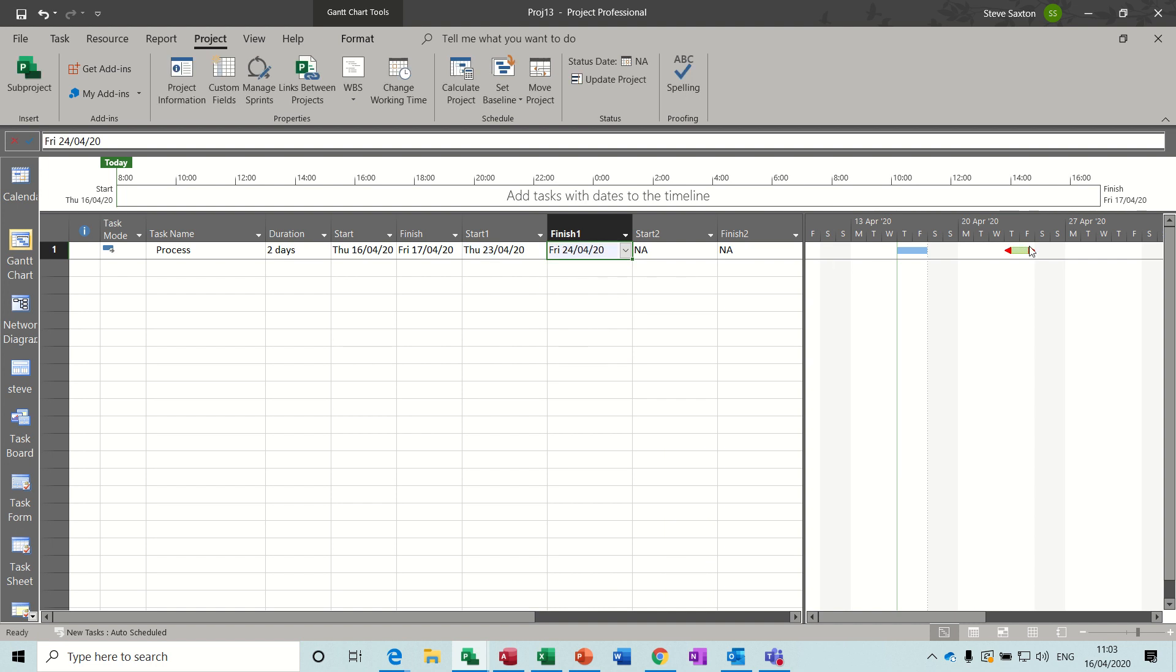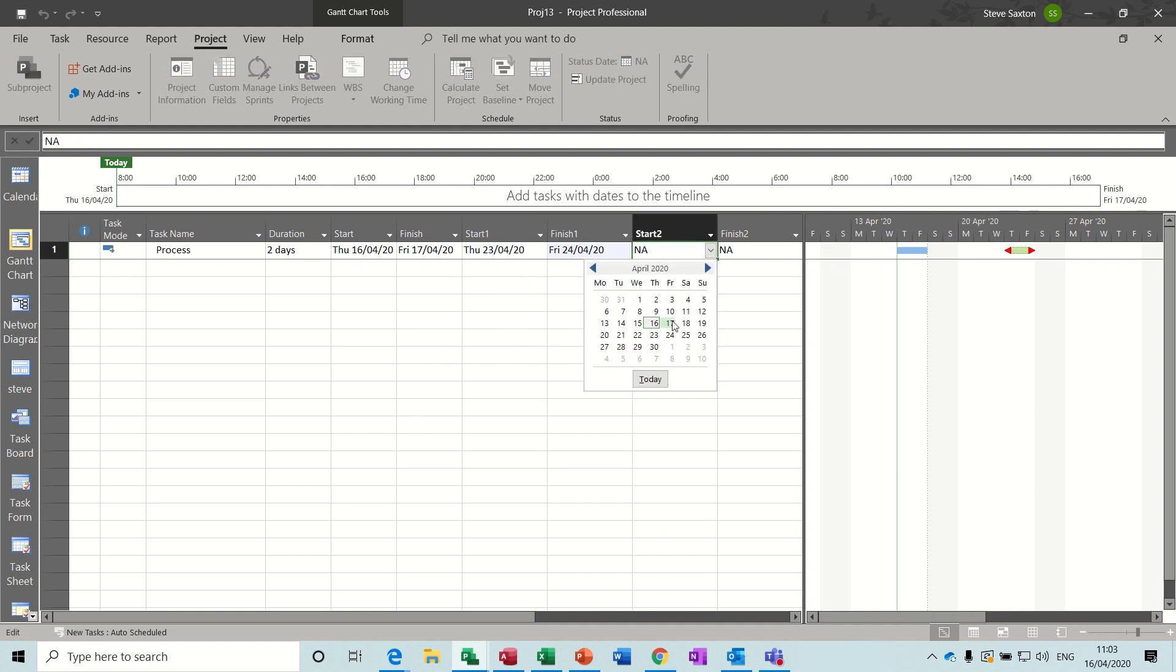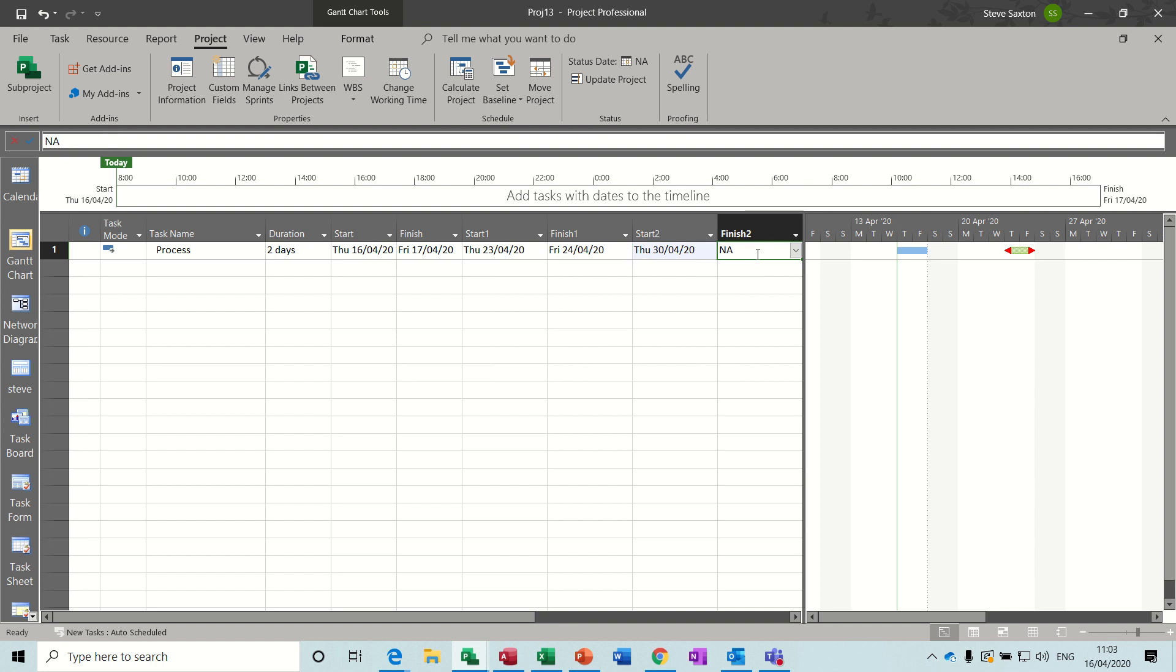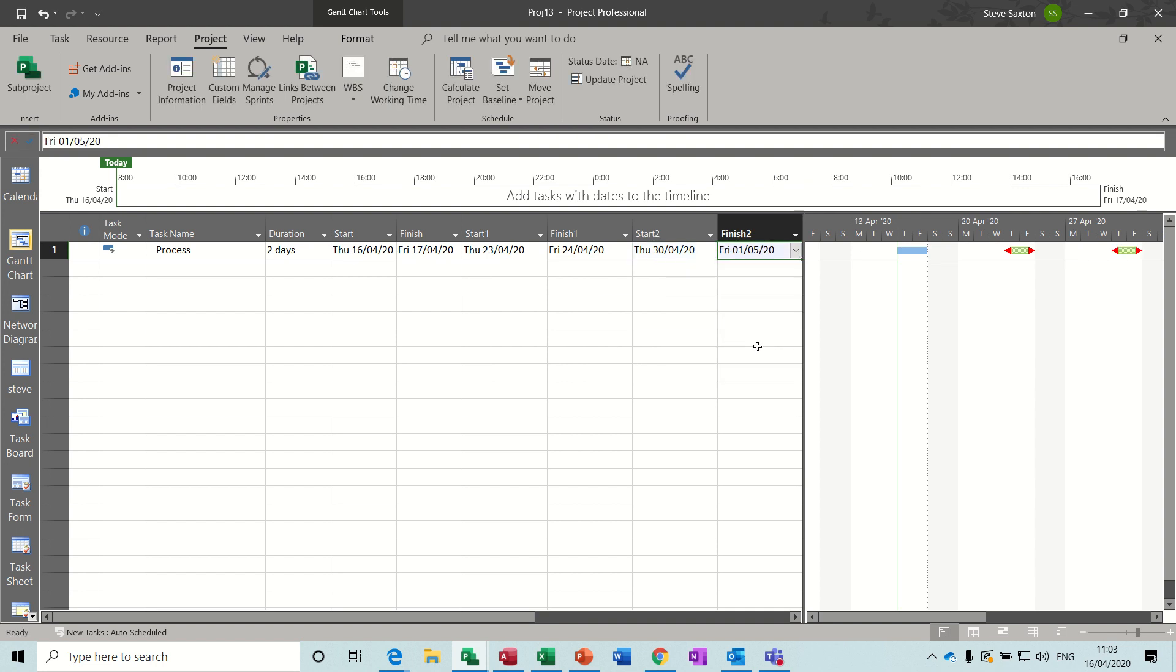Then you now populate with the dates. So I said the 23rd and the 24th for the first one, and you get your little symbol, and then the week after that would be the 30th and the 1st of May, and you get your little symbol. Now this table you can save this table.